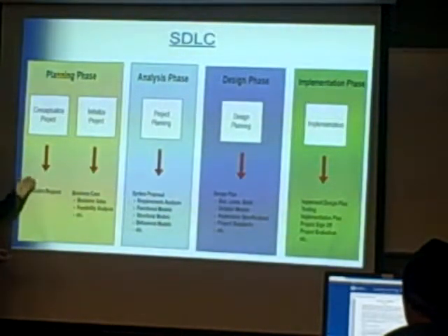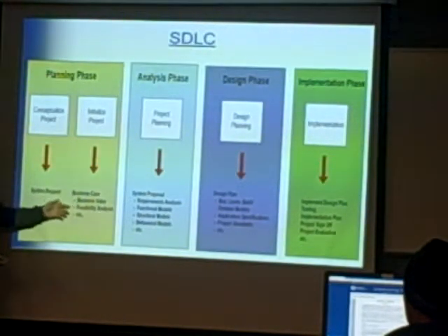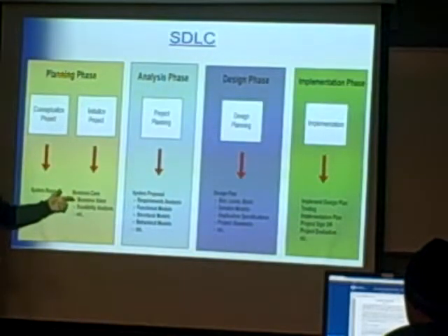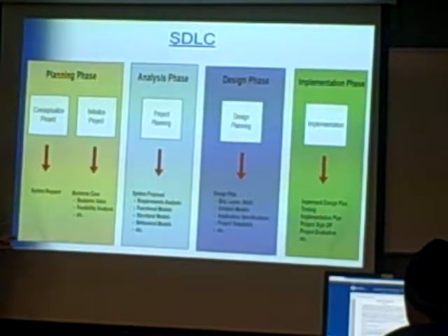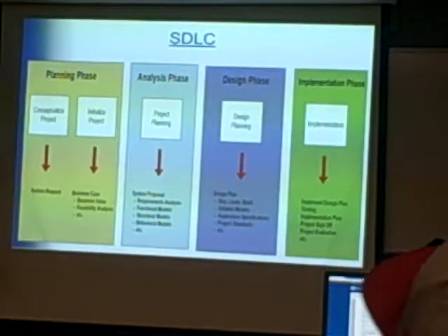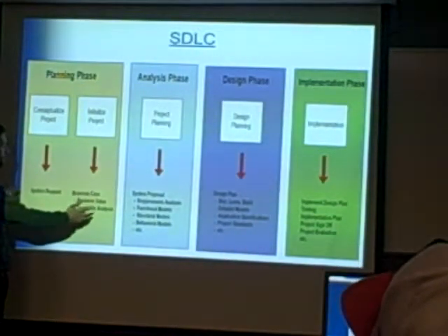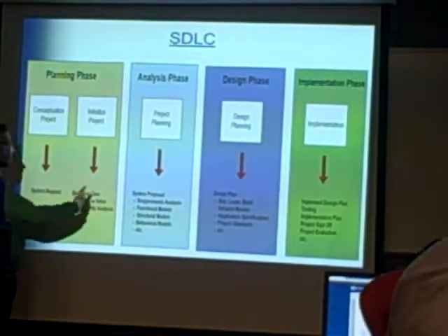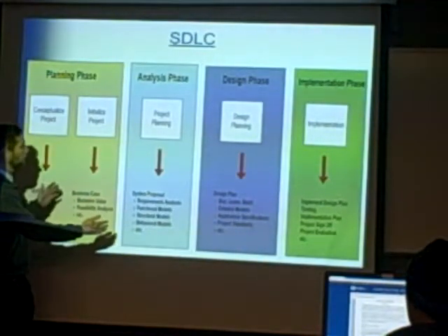So after it's been suggested, if it sounds interesting, then you start working on a business case around it. So things like, can we do it, and is there a monetary reason why we would do it? Does it decrease our expenses substantially such that $20,000 will pay itself off really fast? Or is it going to get us new enrollment on such a scale that it pays for itself because we did this thing? And assuming it passes all those tests, so there's a number of them, we'll talk about them in greater detail in an upcoming class.